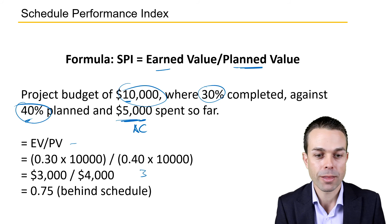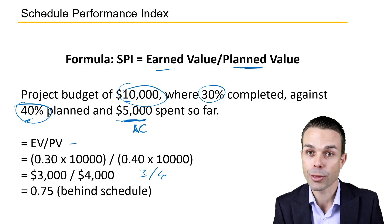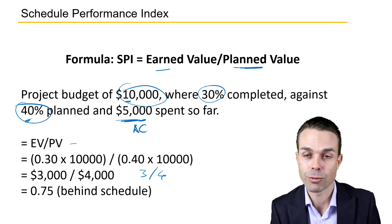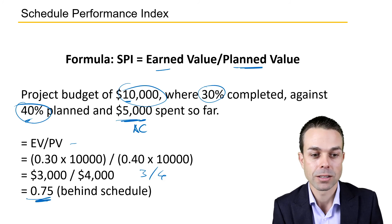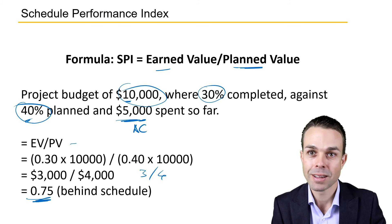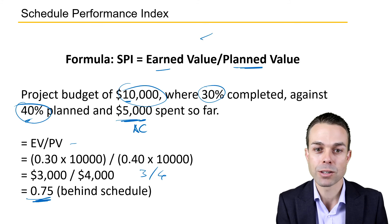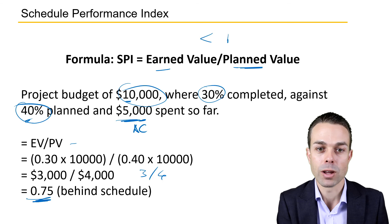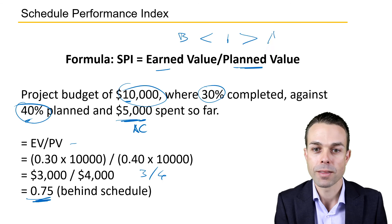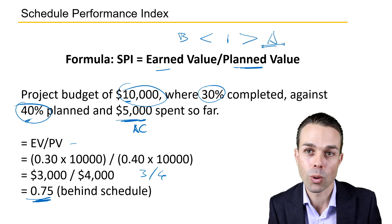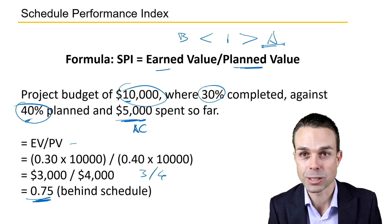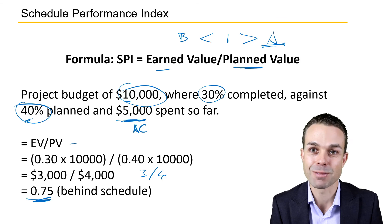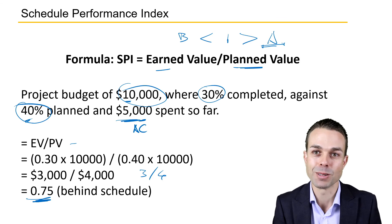So $3,000 divided by $4,000 gives us 0.75. Remember, if it's less than 1 we're behind schedule, and if it's greater than 1 we are ahead of schedule — we have delivered more than what we expected. That is the idea of the Schedule Performance Index.